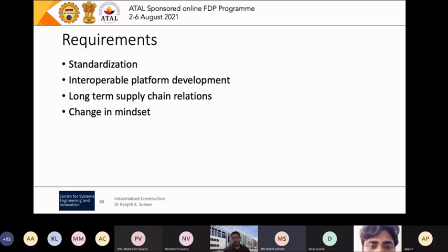Yeah. So we've studied the idea about labor in detail, and with respect to Indian construction, at NIT Madras there's a big body of work by a researcher led by Santosh Loganathan. They were looking at the labor profile of India. If you look at any major construction, the labor are migrant labor, which constitute 90% of Indian labor, and the rest is skilled labor. That 90% is provided by labor contractors. And in any major construction in India, around harvest time it gets delayed, because they go back to agriculture and come back after that.